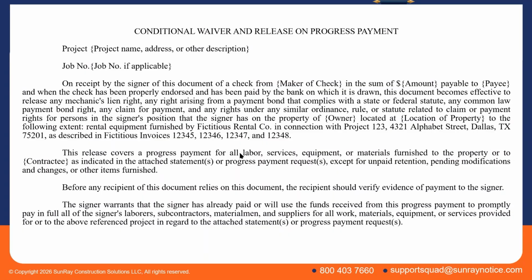And that's the part I wanted to call your attention to. The statutory language ends at "to the following extent." So how are you going to fill out that part that's after the colon? This is kind of an example of how I'd say you should fill it out, because this is the only part of this form that's a little bit challenging. Okay, what do I put right there?